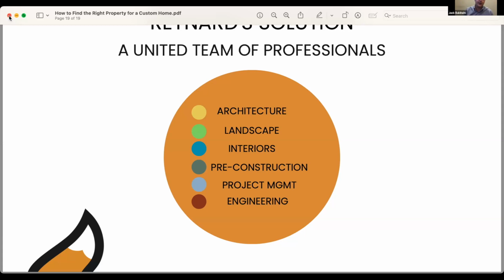But let's say, Sandra, you are talking to a client and you look at a piece of property that needs a lot of work. We've done those projects in the past, and we turned them into successful builds. Well, the first thing I'm going to ask is, are we staying within the four walls of the existing home, or are we going to expand? The moment that we expand, we need a site survey. If we're staying within the four walls of the existing structure and we're just going to remodel, maybe gut it and tear it all out,